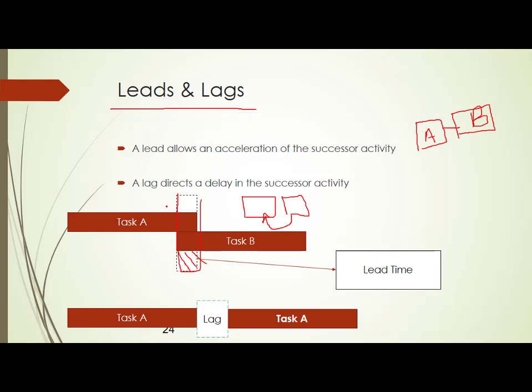What is the lag phenomenon? Just the opposite. After finishing task A, you give some buffer time, say 1 day or 2 days or 3 days, and then start task B. Sorry, there I have not mentioned it as task B, it is showing as task A only. A simple example is your foundation. After putting the foundation, you have a lag time of say 21 days for it to cure before you start erecting the walls. After putting the roof, you have to wait another 15-20 days before you construct the parapet wall. This is called lag time.